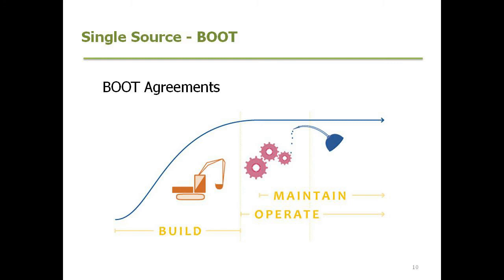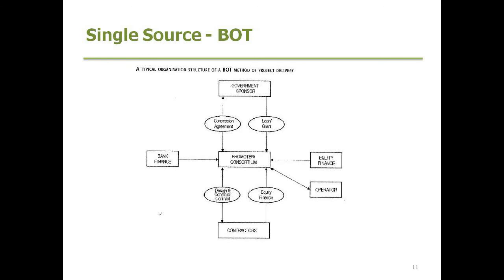So there is often problems with that type of data being compiled at a tender stage, in that a lot of contracting organisations don't have enough data there to necessarily look at that in as much detail as they possibly could.